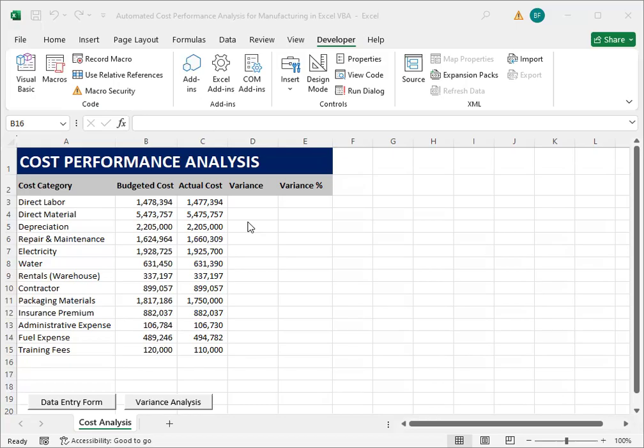So it is the responsibility of the managers, as compelled by the general manager or his vice president, to review the cost performance monthly, or it could be quarterly. So if there are certain lines of the cost category which is positive variance or red variance, then it is the responsibility of managers to put in place an action plan for him to be able to recover for the next review, whether on the following quarter review of the budget.